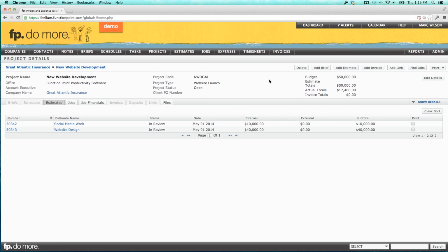So let's say the client, and now a lot of agencies don't need to do this. If you're doing a project-based job and you tell the client, hey, send me an invoice for 25% up front. Most of the time, just do an interim invoice for 25%. Don't complicate things for yourself. It's not necessary. Just do an interim invoice for 25% and move on.